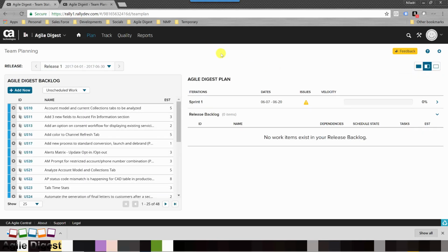This sprint planning works on the basis of release. You have releases, and within a release you may have multiple sprints. As of now, Sprint 1 was under Release 1, and the release has a start date and end date. We can create one more release where we are planning to deploy this sprint. You can do one release per sprint, or multiple sprints in one release.